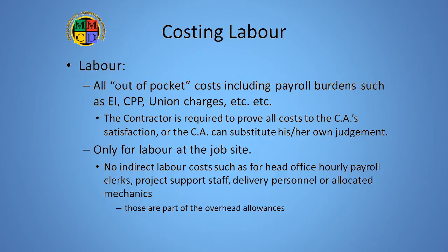Keep in mind that only workers at the job site are eligible for direct cost reimbursement under standby. All workers at the head office or other locations are expected to be covered by the allowance for overheads.